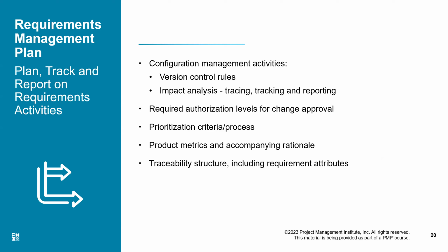With the change in requirements, the product scope might change naturally. It will be reduced or it will be evolving. And as a result of the changes in the requirements, the work of the project, which is the scope of the project, may have to be revised as well.